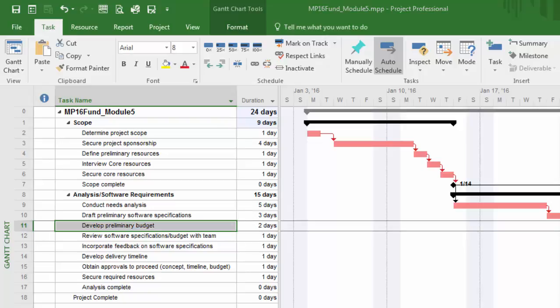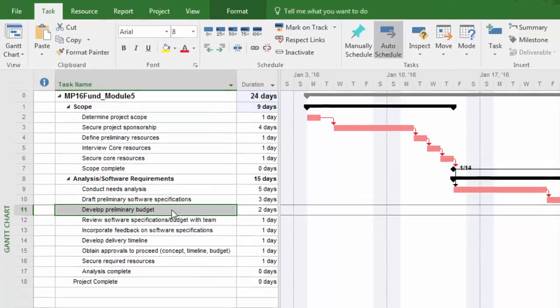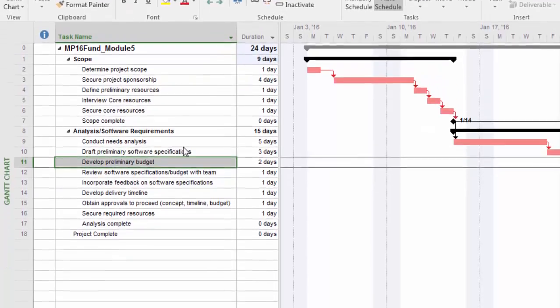Now the opposite of that is working with lead time. Lead time helps us represent overlap between tasks, because quite often before we complete a task, there can be some activity going on in the next task. We want to be able to have that representation, which will shorten our schedule.